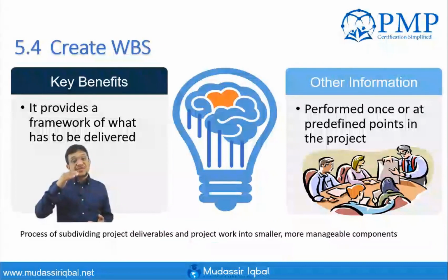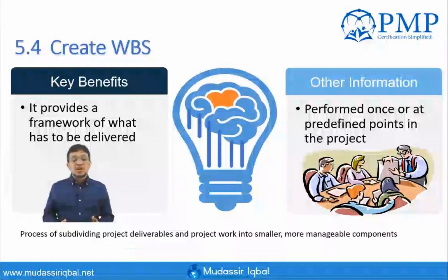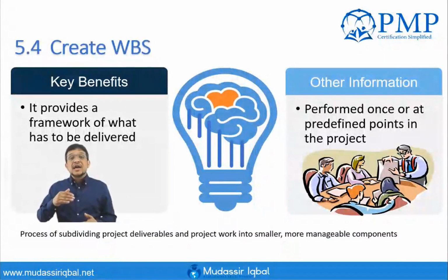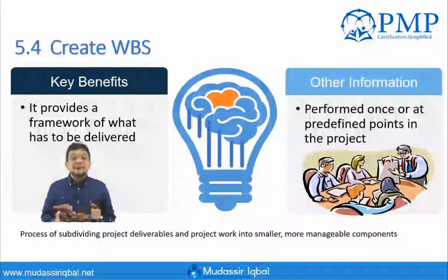You may have a 3-level or 4-level work breakdown structure, but it completely depends on your organization, because you usually get this as a template from the organization. If you are doing a construction based project, you might have 4 or 5 levels, but if you are doing an IT based project, you might be at 2 or 3 levels. Excessive decomposition will be non-productive. So you have to be very careful about the level at which you have enough ability to plan, manage and control the work that is defined. Else it will become challenging for you.